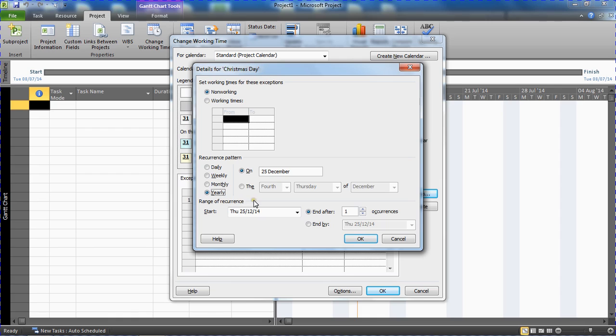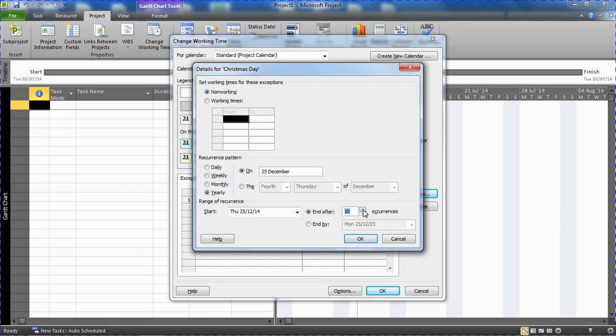And then we've got the range of recurrence and I'm going to up that to 10. You can choose any number there, but I'm looking to maybe save this calendar to a template or something long term. So that if we're frequently creating new projects or we have multiple projects on the go, then our project managers or whoever's involved with this do not have to keep on entering these non-working times as they set up these projects. This can be done in advance because there is a recurring pattern and we can tell this to Project and then save this calendar for long-term use.